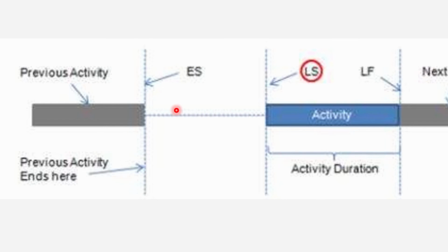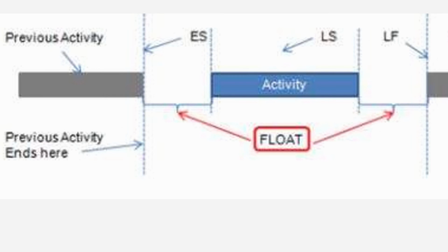Sometimes you will need to move the activity right till the start of the next activity. Just before the next activity starts, you push the time. Under such circumstances, you don't have any float. You cannot afford to waste any time for this activity. Probably the previous activity has this much float, but this activity will not have any float. If it is lying in between two activities, you will be able to understand what float we are talking about.